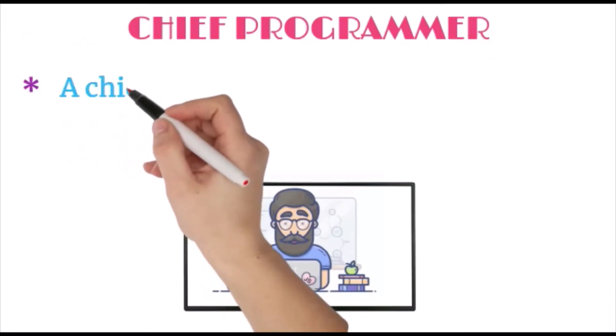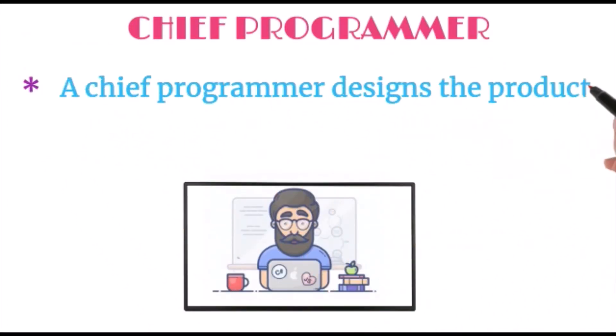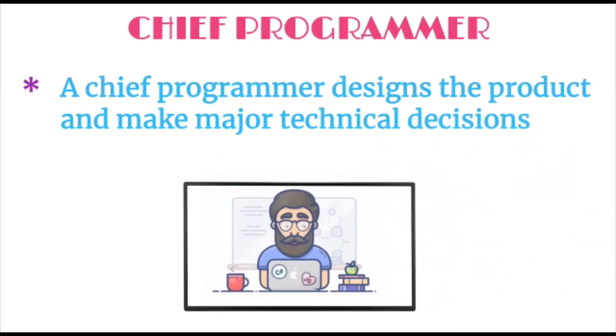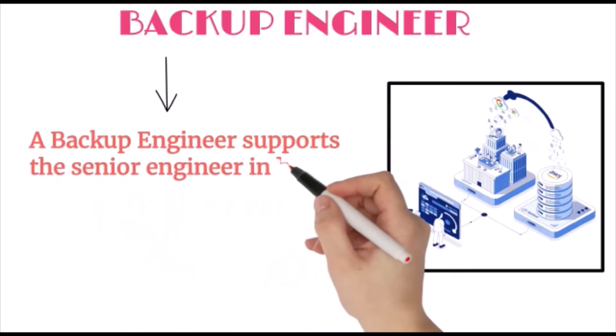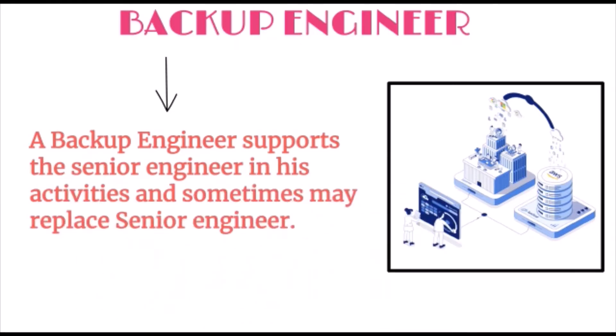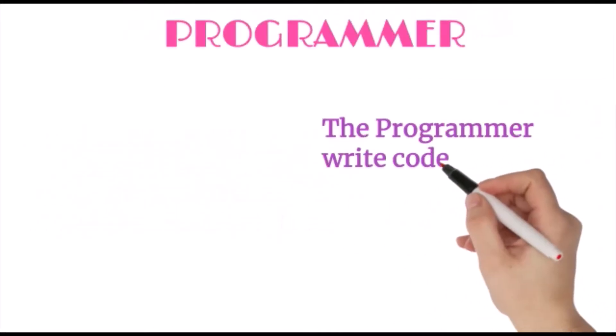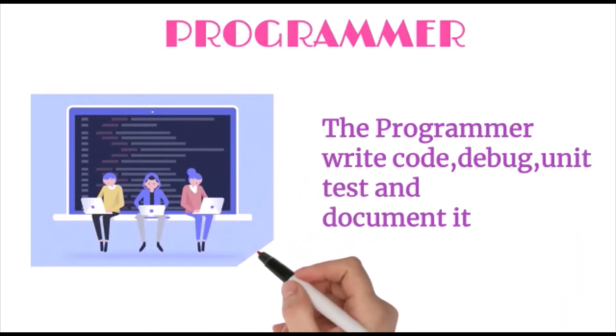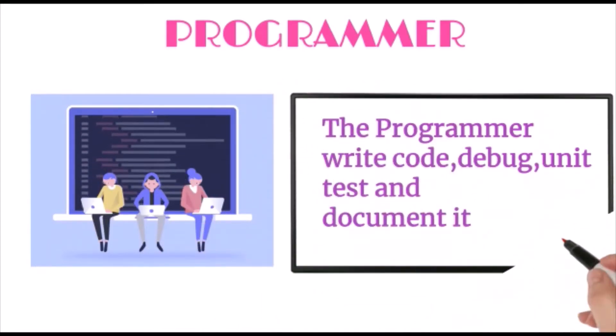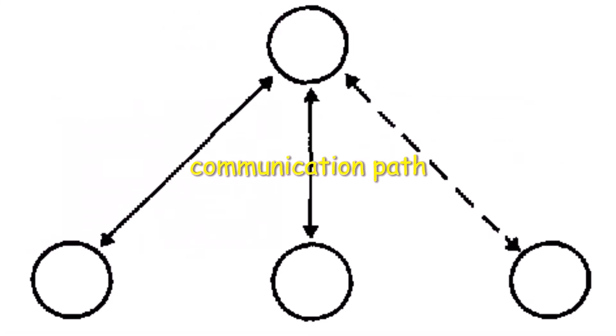A chief programmer designs the product and makes major technical decisions. A backup engineer supports the senior engineer in activities and sometimes may replace the senior engineer. The programmers write code, debug, unit test, and document it. Only vertical communication is allowed here.